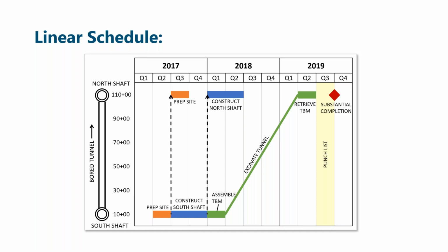James, go ahead. Yeah, so the advantage of this format is you have all of the information now on one page, plus a picture of the project to help people understand what you're building. And you can quickly answer, for example, when am I going to be at station 65? You just have to go to 65 and you very quickly derive, it will be in October 2018 and so on.